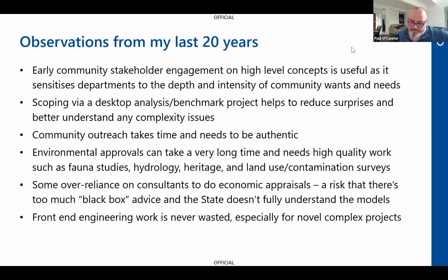And so they had to pay a lot of money to get that done. They had to get an engineering firm in. But that engineering firm that they used was able to then help them as a proof engineer. So they did the initial designs, but when the private sector came in and gave them their designs, they could then convert that engineering firm that was supporting them into helping them provide engineering scrutiny over the private sector consortia's designs. So I think that was quite